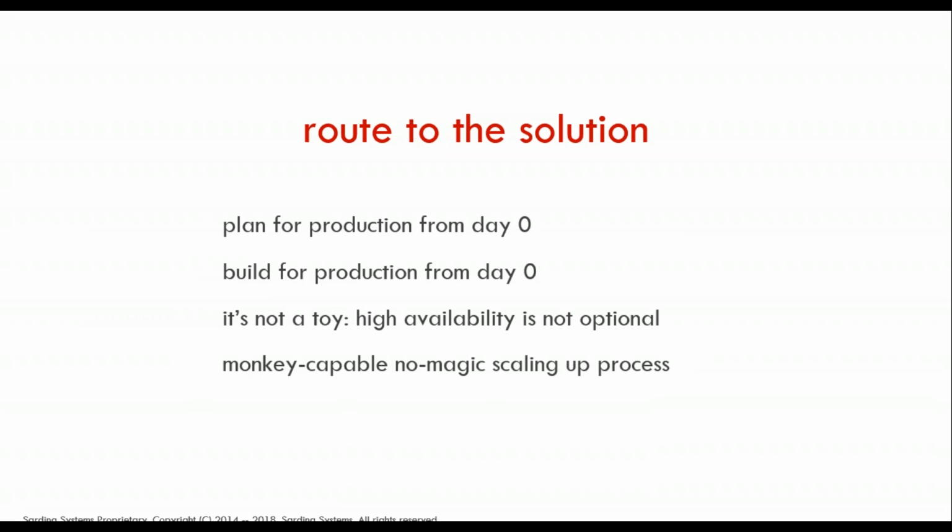The hardware element, it is quite important as well, because in this situation, we have to provide down to the BOM level very specific part numbers for the hardware vendor's parts. Otherwise, the hardware vendor, in this instance, would take a substantial amount of time to put together the solution.